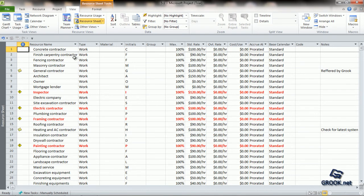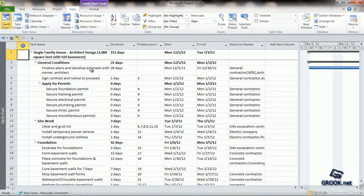At times, it might be required that we need to add additional work resources to certain tasks to either reduce the duration for the task or to offload work from a previously assigned resource. MS Project defines the amount of work for a particular task when we assign resources to it. We can additionally add or unassign resources from the existing resource plan. MS Project also gives us the option of controlling how work will be calculated for these newly added or unassigned resources. This type of scheduling is called effort-driven scheduling, and it can be assigned to particular tasks or for the entire project.